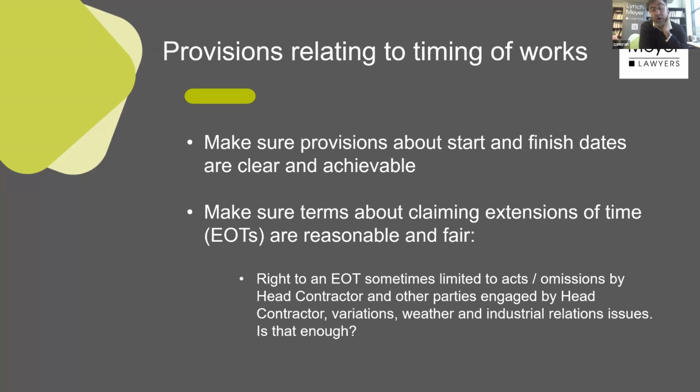But sometimes, as a contractor, it might be best that you have no end date, because you can argue that it gives you room to argue. You might hear terms like "time is at large", which means it's impossible to really lock down what an end date is, and that may work to your advantage. But by and large,